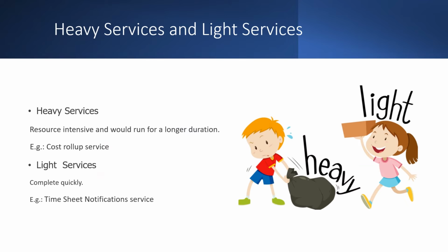PPM services are categorized as heavy or light services. Heavy services are those taking a long time to execute, like the cost roll-up service and the evaluate TM approvers service. Typically, only one heavy PPM service can be running at any given time. This is enforced by having the values for the heavy_Q_max_concurrent_consumers and heavy_Q_concurrent_consumers parameters set to 1 by default.